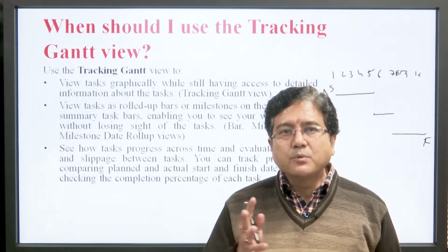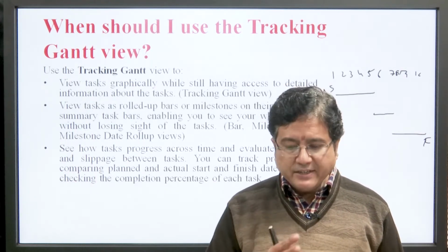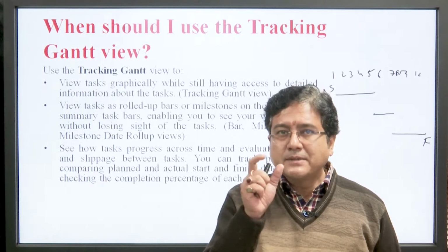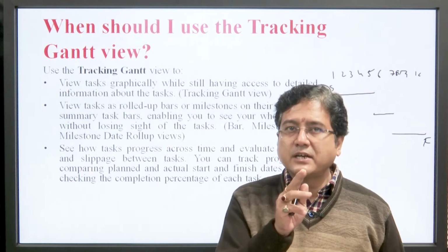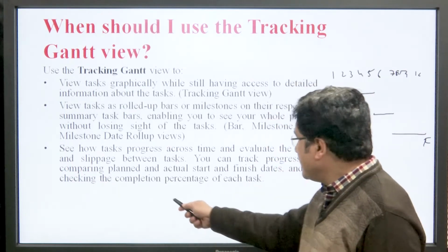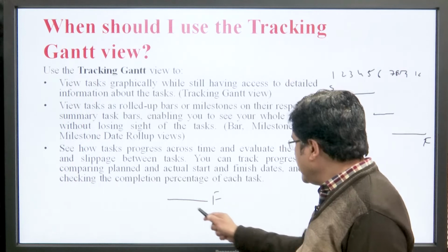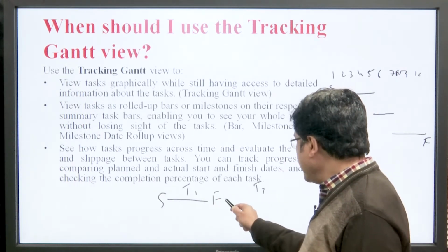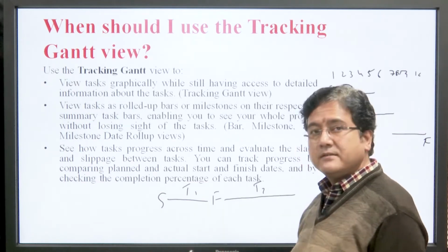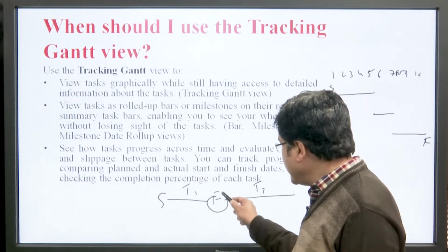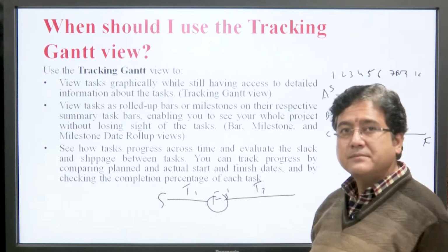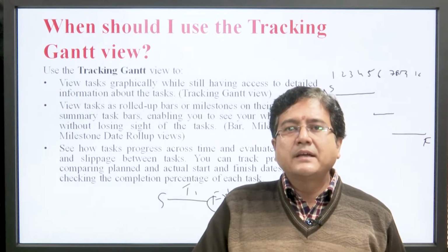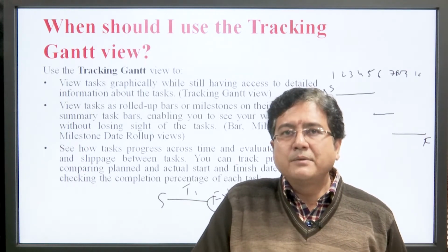See how tasks progress across time, evaluate task slack, evaluate the slippage between the tasks. There are sometimes gaps between the finish point of any task and the starting point of the next task, like task 1 and task 2. There may be a gap of 1 day, 2 days in big projects sometimes. There may be a gap of hours, there may be no gap.